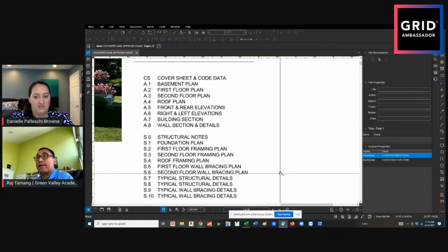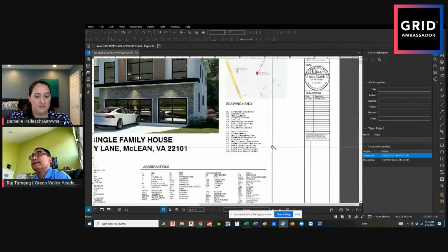Got it. Interesting. Okay. That's kind of interesting. I would have just thought it was included, like everything. No, you don't have to. But like I said, this is a building permit, which is the main permit. Then you get trade permits, which is electrical, plumbing, HVAC, all that. So when he gets an HVAC permit, he needs to submit that. Yeah. Okay. That makes sense.